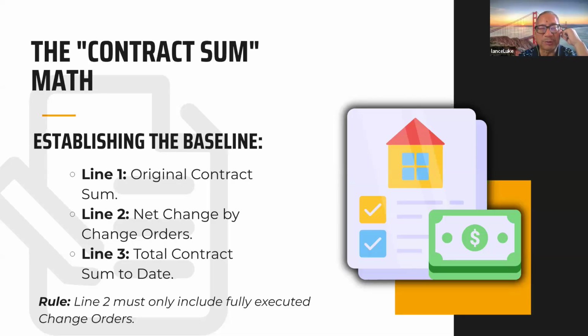Okay, so sometimes there's change orders that are listed. Let's say there's a change order for $20,000. If it's not approved, but the contractor bills for it, it's not going to get paid if there's gatekeepers that are monitoring it, such as the construction manager or the architect. All right, next slide.